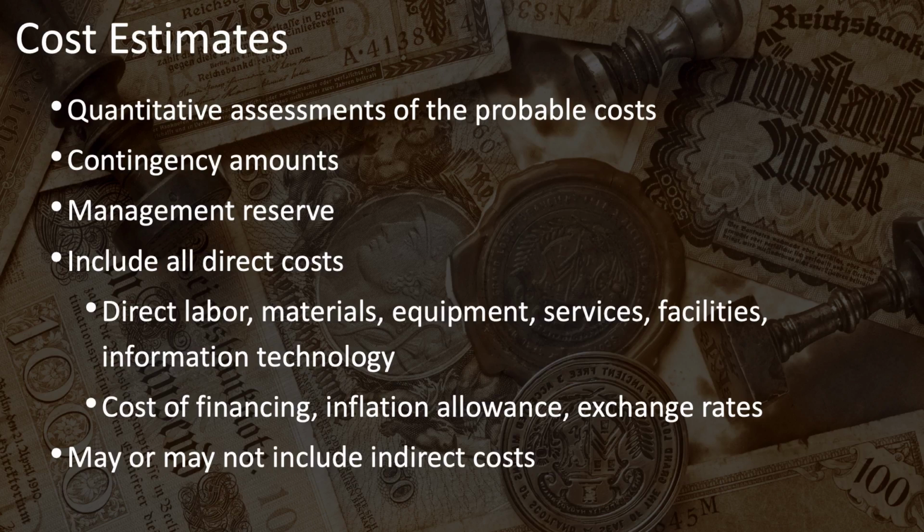And also notice the word probable. These estimating techniques are naturally uncertain. Your estimates will have built into them a certain amount of uncertainty and should be expressed using some ranges of probability or uncertainty. In addition to estimating the costs of all of the work packages and activities involved in your project, you will also want to include contingency funds and management reserves in your cost estimates.